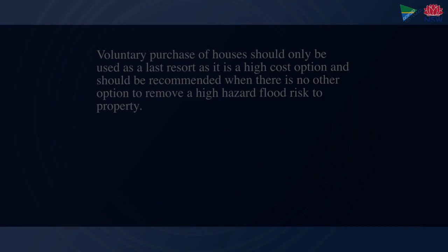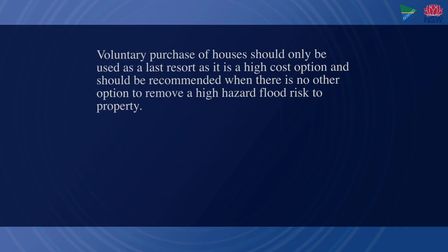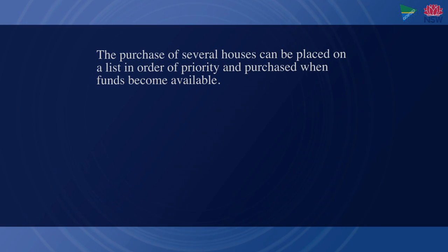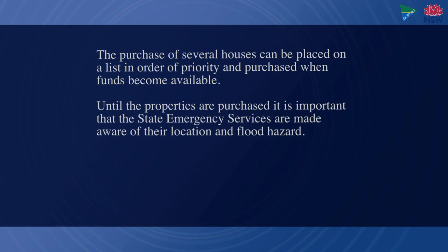It is also important to note that the voluntary purchase of houses should only be used as a last resort, as it is a high-cost option and should be recommended when there is no other option to remove a high-hazard flood risk to property. The purchase of several houses can be placed on a list in order of priority and purchased when funds become available. Until the properties are purchased, it is important that the State Emergency Services are made aware of their location and